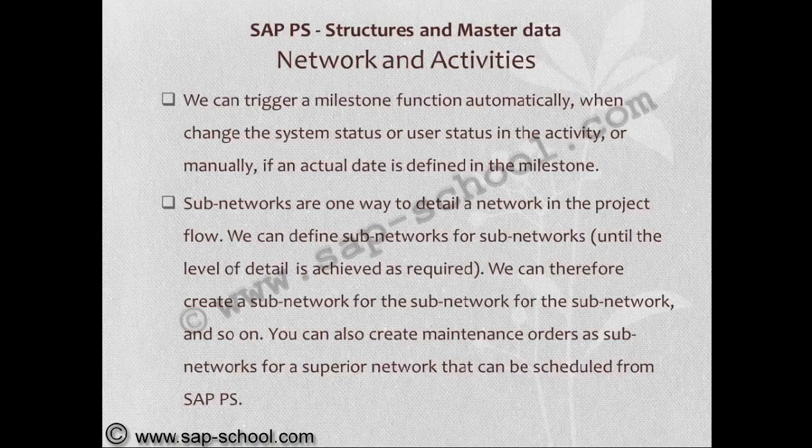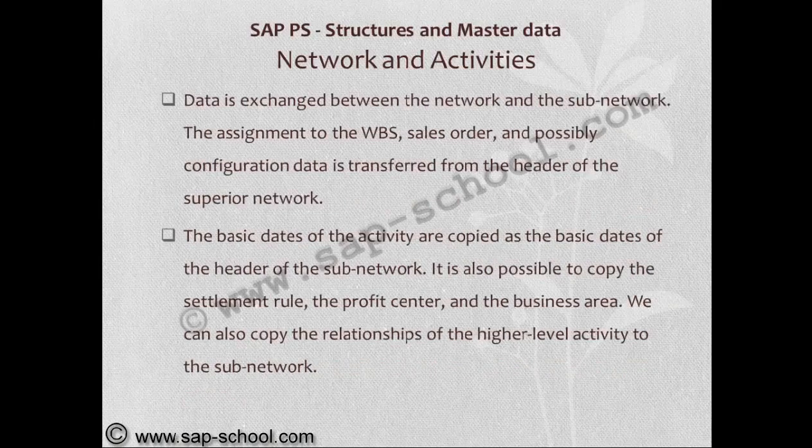Subnetworks are one way to detail a network in the project flow. We can define subnetworks for subnetworks until the required level of detail is achieved. We can therefore create a subnetwork for the subnetwork and so on. We can also create maintenance orders as subnetworks for a superior network that can be scheduled from SAP Project System. Data is exchanged between the network and the subnetwork.